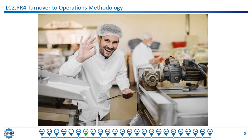Turnover to operations starts the asset's life clock. Operating hours begin at the time of turnover, maintenance and calibration intervals start, and performance tracking is initiated. This is a great time to hit the ground running — not a great time to begin thinking about loading asset information into the CMMS or figuring out if parts are available for maintenance tasks that haven't yet been developed. For some period after turnover, any disruption or failure of the new equipment should be investigated for root cause, in order to find any opportunities for improvement in the pre-operational processes such as FAT, if the problem could have been discovered then.